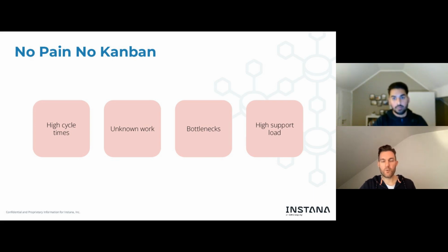And as Daljit mentioned, with this pull system, those new feature requests and bugs land in your backlog, but they don't accumulate cycle time while lying in the backlog. So they can just sit there waiting for your work in progress limits to free up again. And as long as the limits are reached, all your columns and lanes are completely full because everybody's working on stuff, those will sit there.